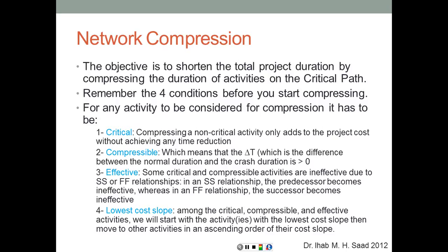Number 2, it has to be compressible. If its delta T is equal to 0, which means its normal duration is the same as the crash duration, then this activity cannot be compressed, so do not waste your time or money. Third, it has to be an effective activity. And this is the very interesting part here.